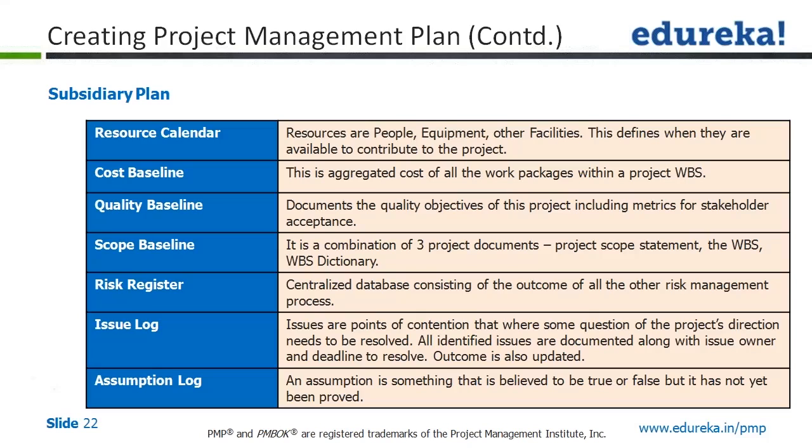So you must know the availability of each of the resources, and by region, since there are multiple regions or cities, there would be some non-availability of people, either because of their own schedule or because of cultural festivals or government holidays. You need to keep all those in mind.